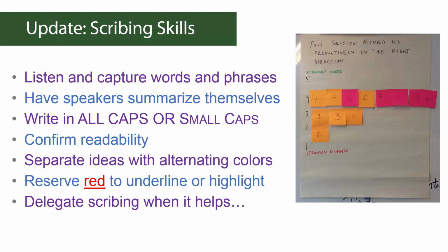So some organizations that are successfully able to deal with a lot of remote workers, you'll find this sort of counterintuitive thing where, okay, we're going to have a meeting, but with 5 people in the office and 3 people not, everybody goes to their desk and interacts through the computer. And it's like, well, why don't these 5 people all get together, and then at least they'd be together? But for certain types of activity, especially retrospectives, if you get yourself in that situation, you're basically putting those other 3 people at such a disadvantage that it's going to be really hard to get a full, robust participation in the retrospective.